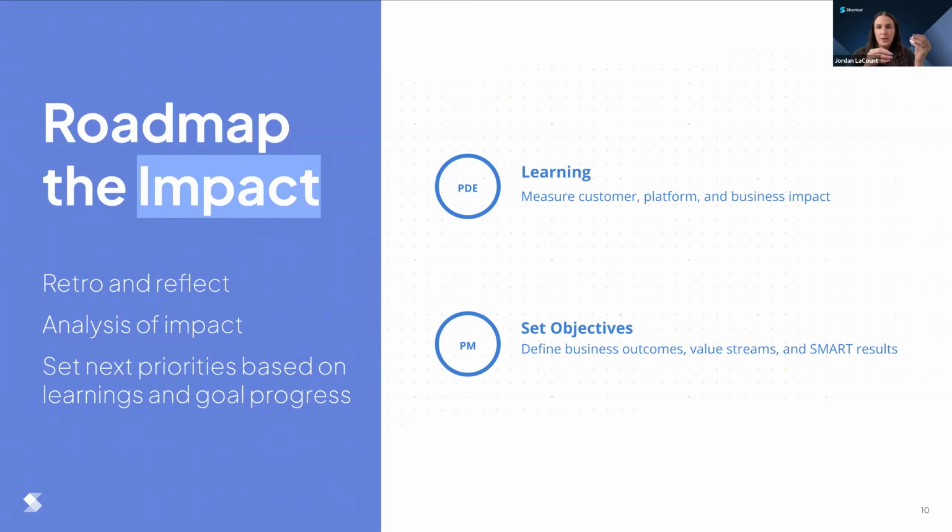So here, work that's released to the end user has entered that learning status. So we use an epic status for learning. It remains there and on the roadmap until we've retroed on it as a group and learned enough about impact. Depending on the release, enough might be a week because it's a quick change that we meant to have in there previously, or it could be a couple months if it's a brand new feature.